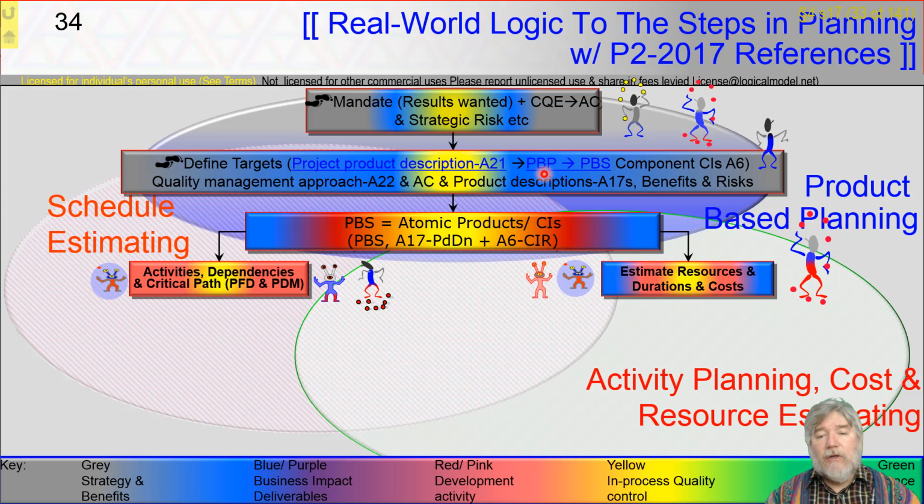So we get to a position in all of the different frameworks, independently of what their vocabulary is, where we have a list of activities. Some of those activities are about building the product, just raw bricklaying type stuff, and some of those activities are about confirming quality. So if you lay a brick, you put a spirit level on the top of it and you tap it around so that you don't get it at this angle or this angle, but it's level. So in all cases, whether we're doing this on a 2-week basis or the next 10 years basis, we have turned the business need into a set of activities where those activities have a focus on quality.